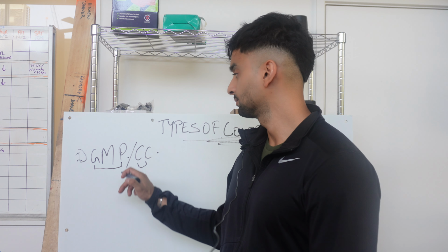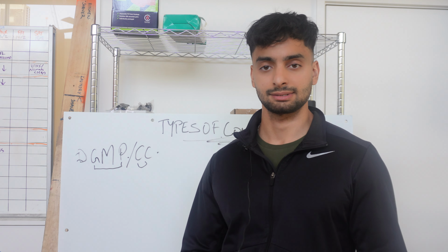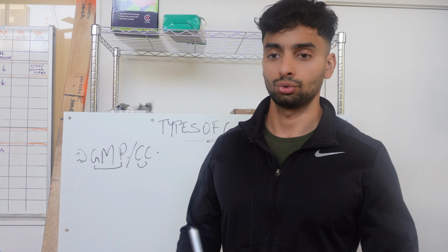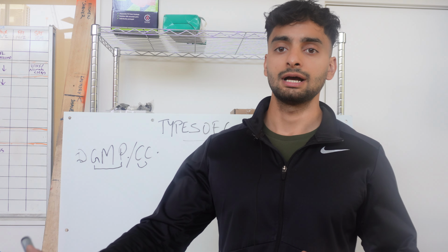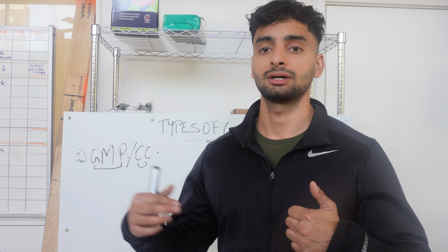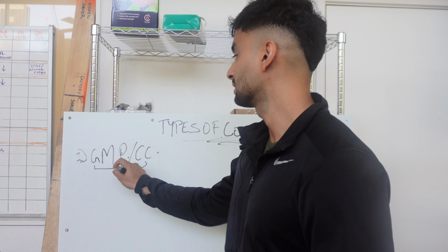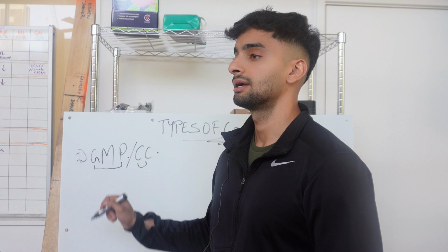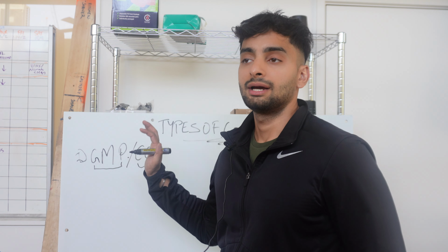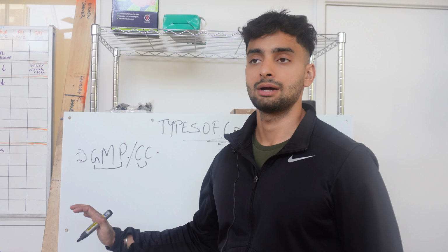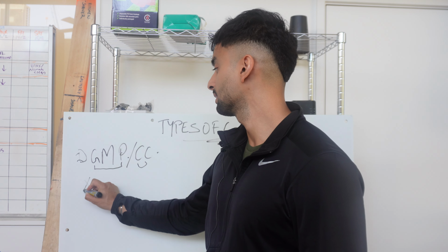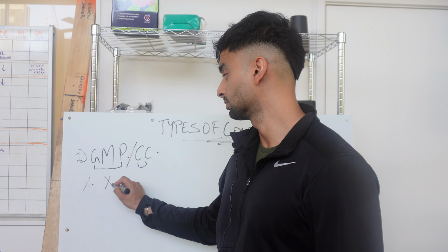Basically, GMP, which stands for Guaranteed Maximum Price contract, means that you are going to hire either a contractor as a developer, or you are going to hire as a contractor your subcontractor, at a guaranteed maximum price, which means that there is going to be a price cap, and usually there is also a time-bound limitation as well. So you should have the works finished in X amount of time for X amount of dollars.